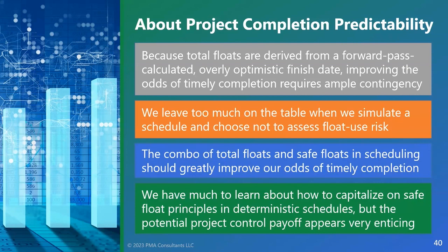Well, I kind of just hinted at that. I think we're back to the drawing board. In reality, if all parties to a contract, the contractor, the owner, the subcontractors, want to have an honest assessment of how delay impacts your project, you will want to simulate your schedule. You want to make sure you have safe starts. And like Dr. Vivek pointed out, relying on critical path delays when there's little uncertainty on the critical path is not the best solution. The best solution is looking at how delay may impact your p-value and your completion date.